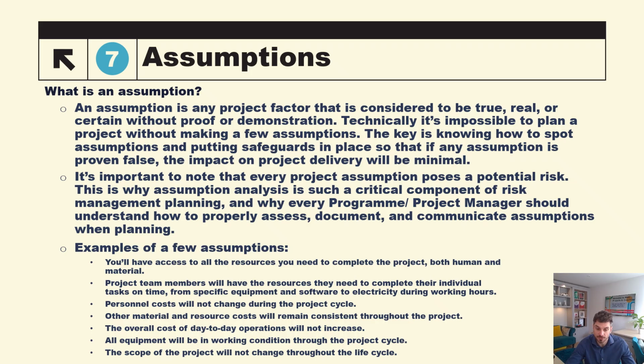Personnel costs will not change during the project lifecycle. Other material and resource costs will remain consistent throughout the project. The overall cost of day-to-day operations will not increase. All equipment will be in working condition through the project lifecycle, and the scope of the project will not change throughout the lifecycle.